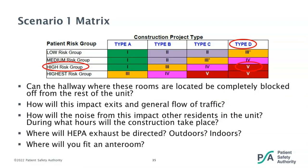Other important items to consider in this scenario include: how we block off the hallway where these rooms are located to be completely separated from the rest of the unit still housing other residents; how this work impacts exits and general traffic flow; how the noise will impact other residents and during what hours construction will take place; where the HEPA exhaust will be directed — can it go directly outdoors or will it need to exhaust indoors; and where you'll fit the anteroom. With Class V precautions, an anteroom is required. It needs to be large enough for equipment staging, cart cleaning, and workers, and should be situated adjacent to the entrance of the construction work area.